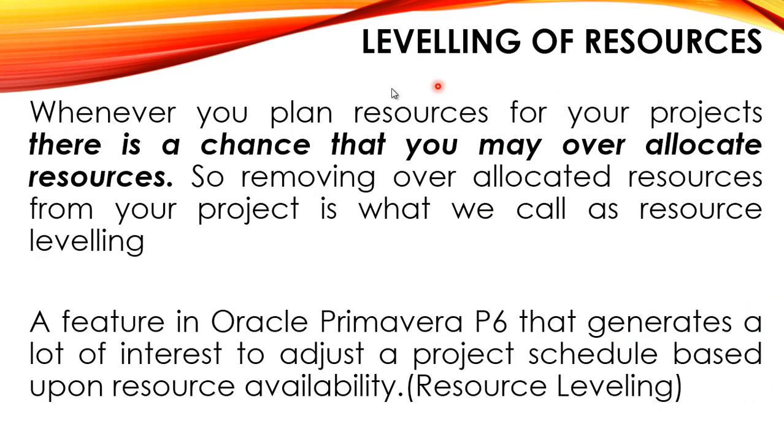Leveling of resources. Whenever you plan resources for your projects, there is a chance that you may over-allocate resources. For example, if you have 3 masons and you are performing 2 activities and using the masons in both activities, there may be a chance that they start overlapping. This is called over-allocation of resources. Removing over-allocated resources from your project is what we call resource leveling.